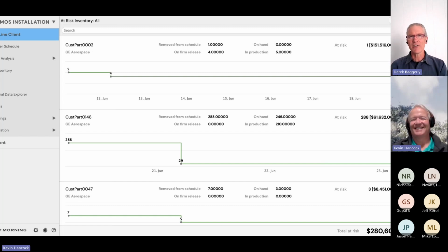Like, okay, well, if you've got good 10% margins, you've already spent, so this was within lead time. They've already bought the raw material, already put the production plan in place, already started production. So they've essentially spent in effort, raw material, and time $25,000 out of the 28 that they're eventually going to ship. And now they don't get to ship it. So they have to carry that for 8 months, right? That's a huge impact to any size company.